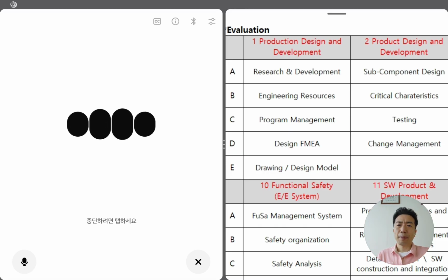When a design change occurs, we update the drawing, communicate it to all relevant teams, and require confirmation that the new version is being used. This process ensures our drawings and design models are always consistent with customer specifications.